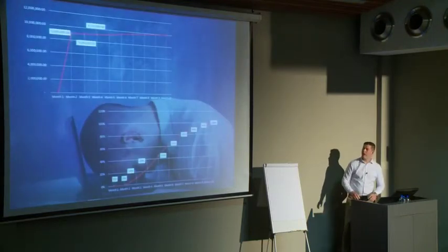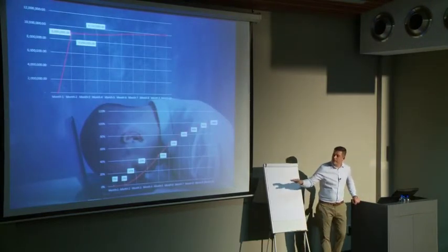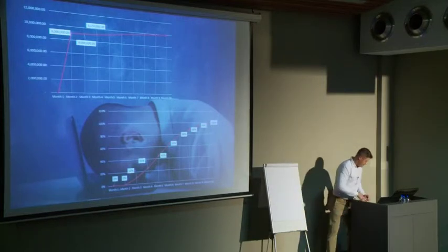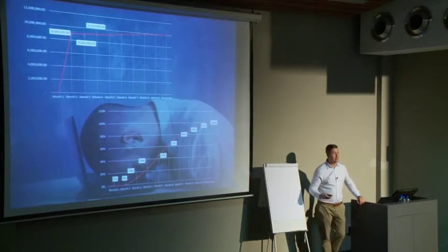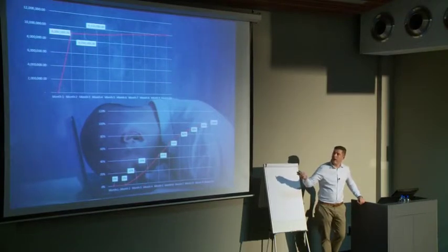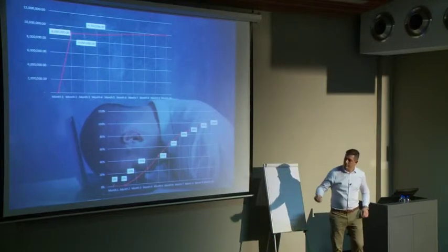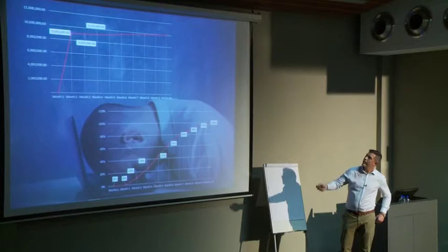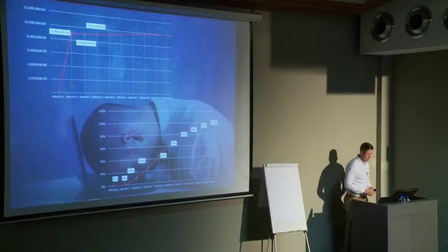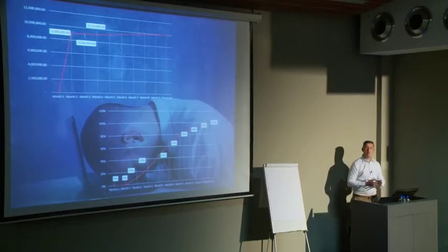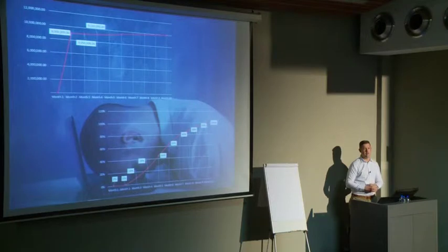So this next slide was just where I showed you the planned curves. You can see there in month 2, just find my cursor here. In month 2, it's 0%, that's the planned. The actual is also 0, so we are on par because I have apples with apples here, work-based with work-based. There I have 9 million planned at the top, and also my actual in month 2 was 9 million. So I am on par. This is extremely important to understand before we go into earned value. But I think you guys get the gist of it.